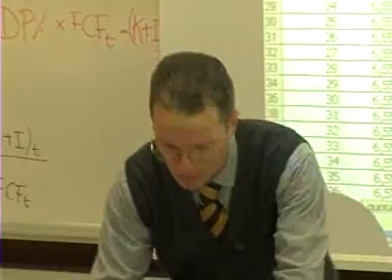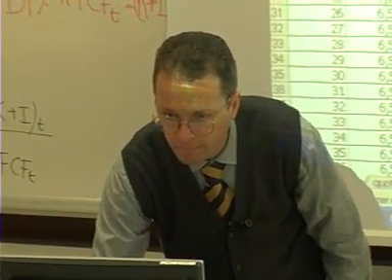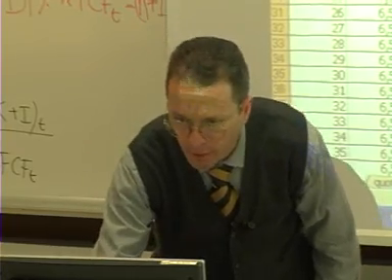Let's calculate it. Let's, for example, use a dedicated percentage of 60, and let's see what happens. Again, look at the number of semesters that are necessary in order to repay the loan. We have arrived at the 21st semester, and it is obvious, because I have used a lower amount of funds in order to pay back the banks. Instead of using 70% of the flows, I used only 60%.